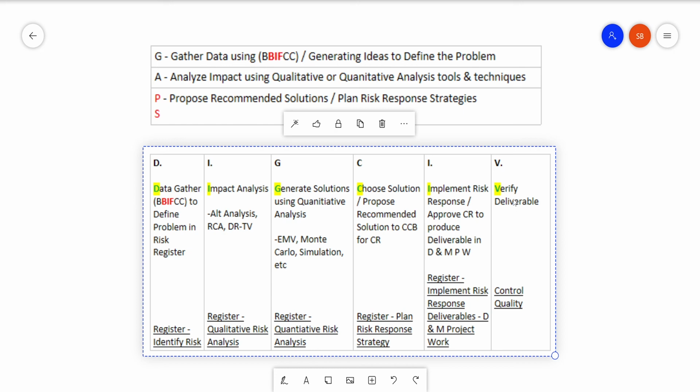And then once the deliverable is verified by the quality control team, that deliverable is submitted to the customer so that the customer validates the scope. And then once you get an approved acceptance deliverable from the customer, then it goes out to closing. So that's really the nuts and bolts of a lot of the processes. There are other connection points, but that's basically how I've seen a lot of it, how to solve different conflicts.